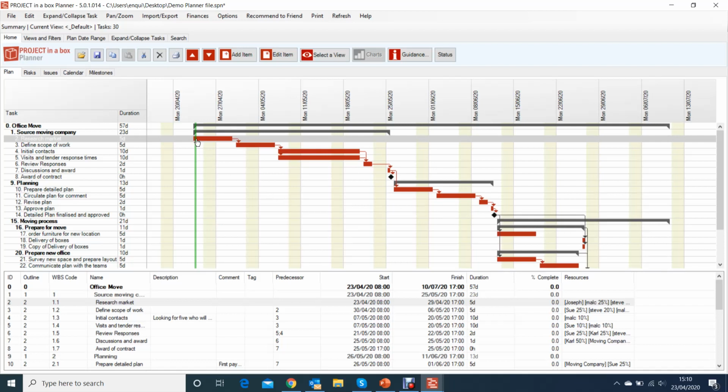So that's really quite a neat way of rearranging my tasks. I can just set up my template project and zip it all forward. Of course, if they're all running on dependencies, you don't need to do that. But often, real projects don't have a fully dependent chain of activities. Some things have been set to start on particular dates. Of course, you might then need to rejig it, but at least it's moved everything the same amount forward as a starting point, and then you can go and look at that.